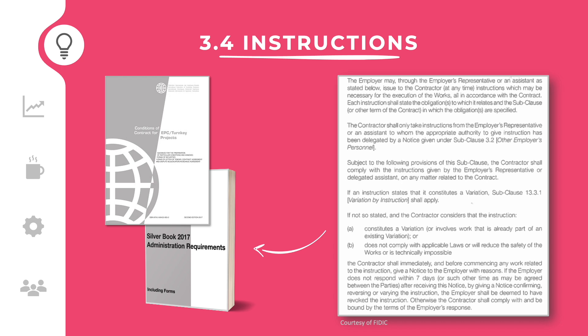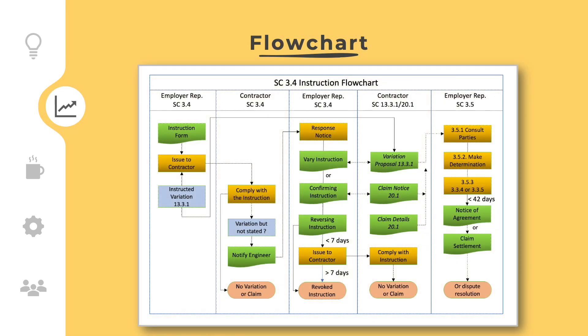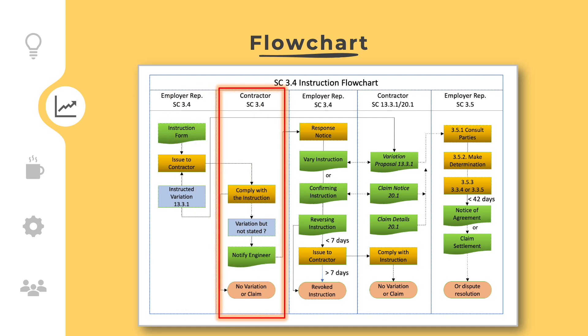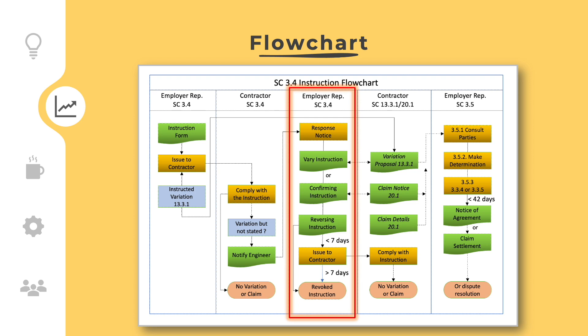In the next section, we will explain the instruction process on a flowchart. The instruction process starts with the employer's representative who must prepare the instruction. The employer's representative shall clearly indicate whether the instruction is a variation or not. The contractor shall review the instruction and notify the employer's representative if they think that the instruction is a variation or has any other objections. If there are no objections, then the contractor must comply with the instruction. The employer's representative must respond to the contractor's notice within seven days.